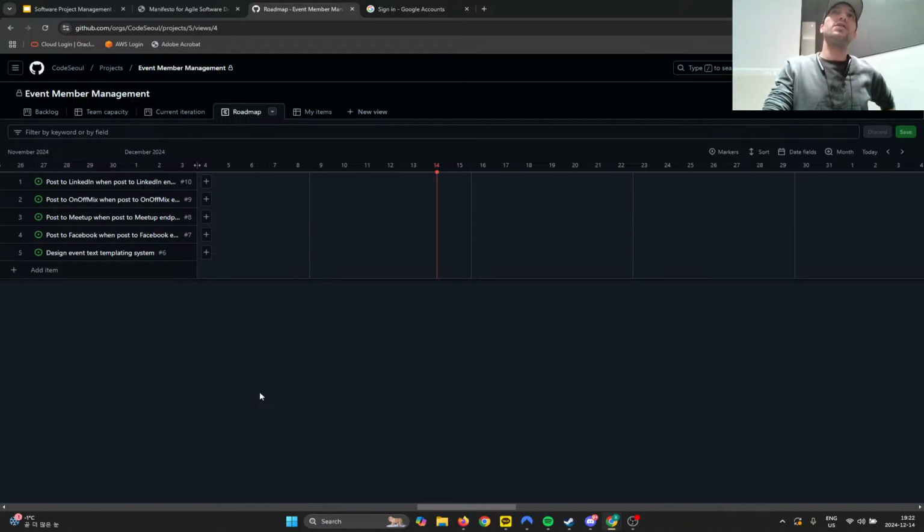So in Jira, one way that you could solve that is basically on your board, you link it to the target issue, but then the problem is that issue won't show up on your own board. It'll just show up if you go into the issue that has the dependency, which is not great, but it kind of works.